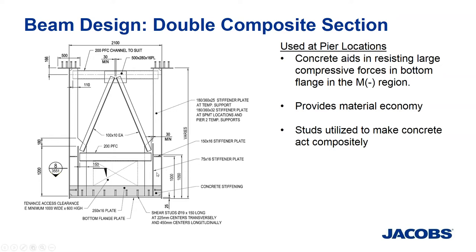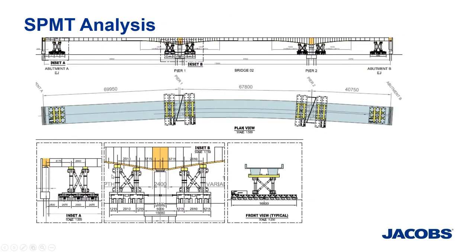The SPMT bridge move was performed by Sarens. Several SPMTs were located along the bridge for pickup — two supports at each pier (one on each side) and one at each abutment — and they had to squeeze in between the temporary supports. The bridge was brought parallel to its final configuration, then they swung the south end first to clear the substructure of bridge number three, then maneuvered the north end by rotating into position. The bridge move had a 54-hour time window starting Friday night, needing completion by Monday morning.